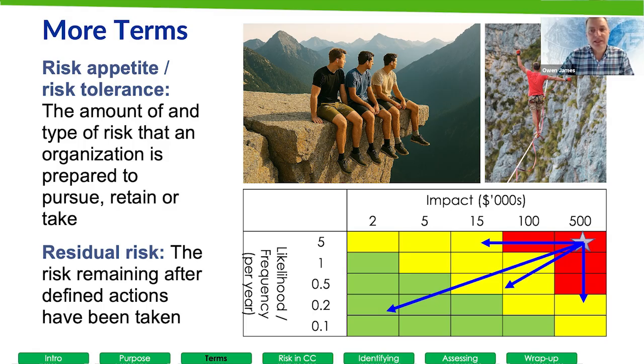So we use this understanding of risk space, here we are in risk space, to help us understand what is acceptable or not. So you may have seen risks ranked as red, amber, and green. The inference of that is that you are defining risk acceptability or risk tolerance levels. So organizations may not realize that. If you say, right, okay, I've got a risk boundary here, anything above this is not acceptable.